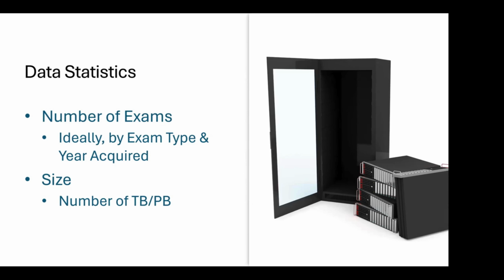So when you're assessing older data sizes, also consider things like image compression. So very old data may not be compressed. So some people will look at more recent data and just collect off of that, or only go back so many years when they're doing their statistical analysis. But you have to consider you may see variations as you go back. It's not converted.